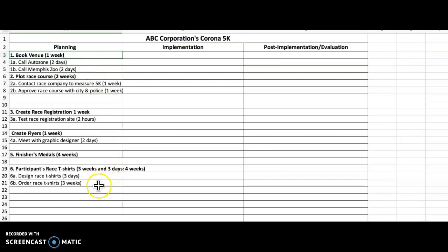So starting from the bottom, we would look at our 6 main deliverables here. So we estimated an additional buffer with 4 weeks, 4 weeks. So we're at 9 weeks, 10 weeks, 11, 12, 13 weeks. So we would say 13 weeks for planning.